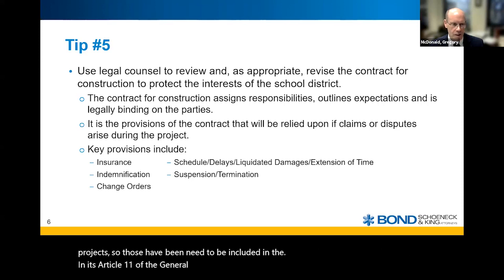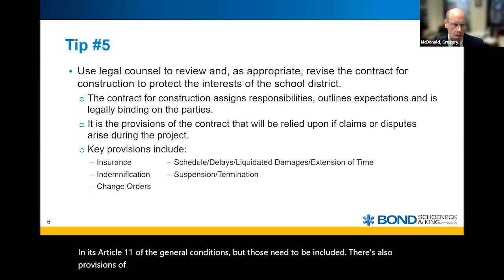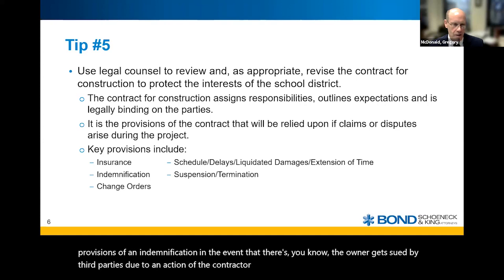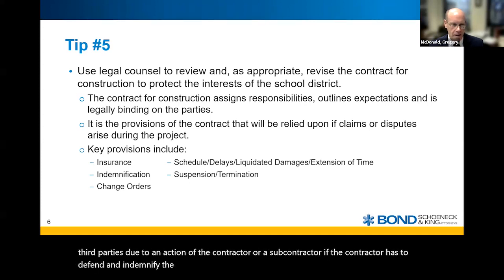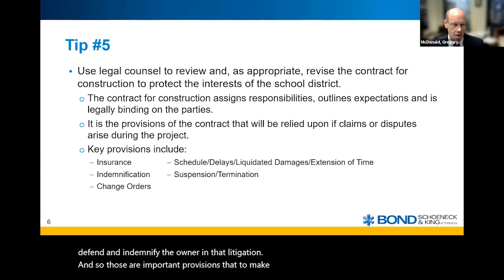There are also provisions of indemnification in the event the owner gets sued by third parties due to an action of the contractor or its subcontractor. The contractor has to defend and indemnify the owner in that litigation. Those are important provisions to make sure they're in there and they adequately protect the owner.